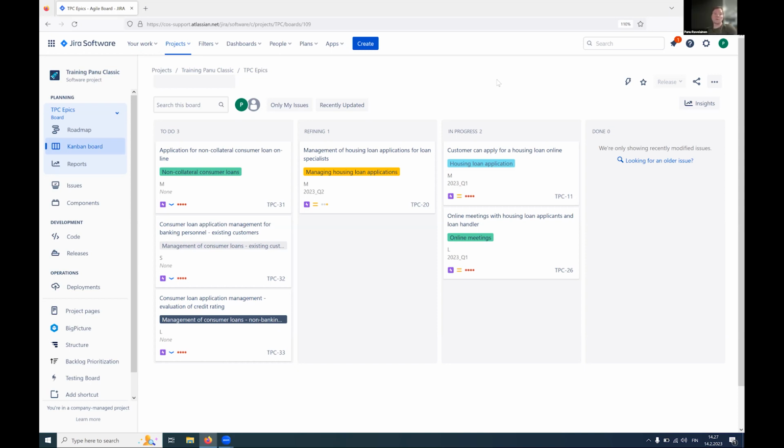And also, when we know that something is relatively small, maybe it doesn't bring as much value as something else, but if it's really quick to do, maybe it's still worthwhile doing that quickly and getting it done and to the customers and starting to realize the value from that thing already, and then starting to implement the bigger things that we have pending. Yeah.